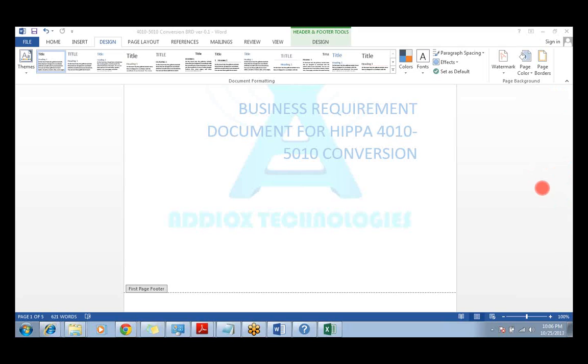Okay, anyhow, in your business requirement document, there is a place where you list down the document history. Document history is what? First iteration, what has changed; second iteration, what is the change, like that. When you are maintaining the document history, that means you are keeping track of all the changes in every version you are making.